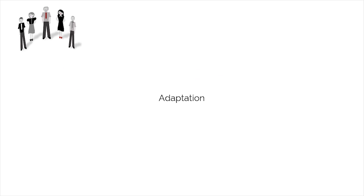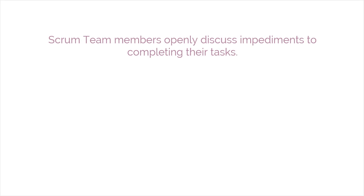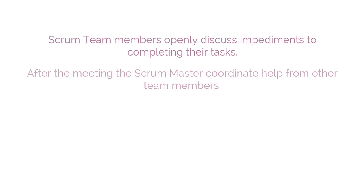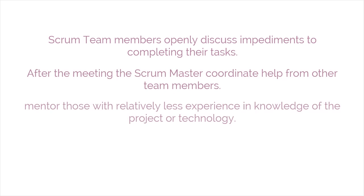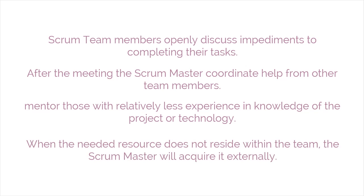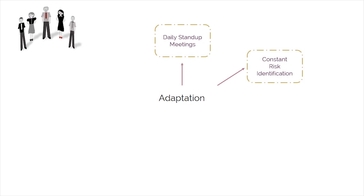Some examples of adaptation include the following. In daily stand-up meetings, Scrum team members openly discuss impediments to completing their tasks. After the meeting, the Scrum Master coordinates help from other team members. More experienced members also mentor those with relatively less experience and knowledge of the project or technology. When the needed resource doesn't reside within the team, the Scrum Master will acquire it externally.